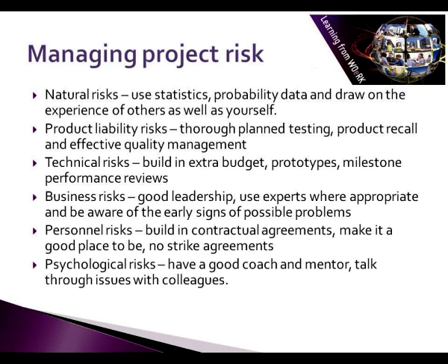Thirdly, we've got technical risks. To tackle these risks, build in extra budget, prototypes, milestone performance reviews, and so on. Business risks. Handling business risks involve good leadership and using experts where appropriate and being aware of the early signs of possible problems. Personnel risks. To avoid the risk of losing key personnel, build in contractual agreements, make it a good place to be, and create no-strike agreements. And then there are psychological risks. To reduce these, have a good coach and mentor and talk through issues with colleagues.